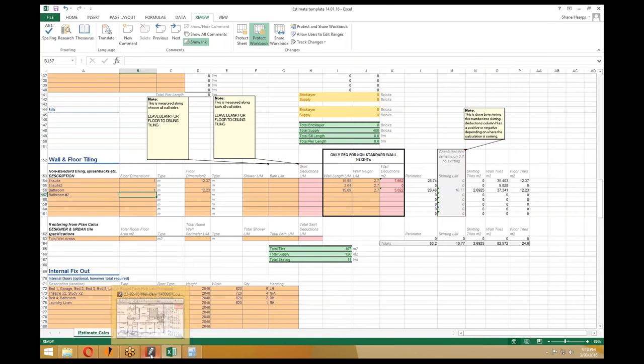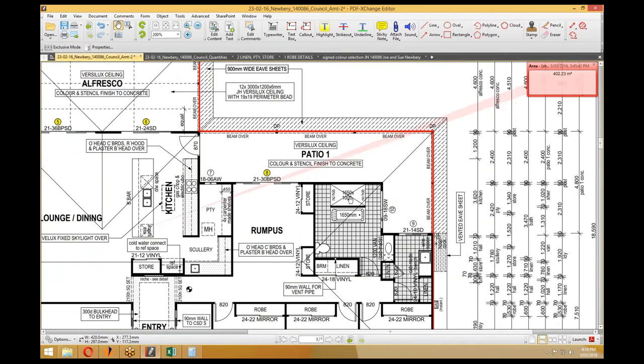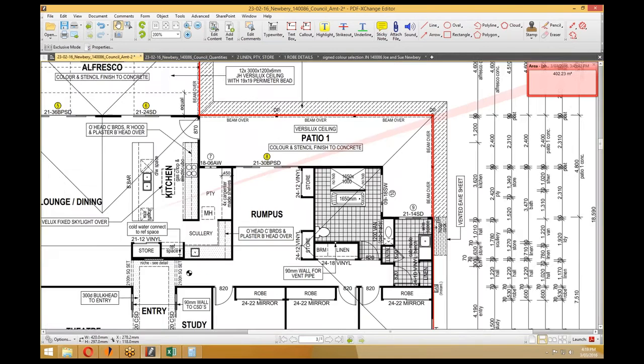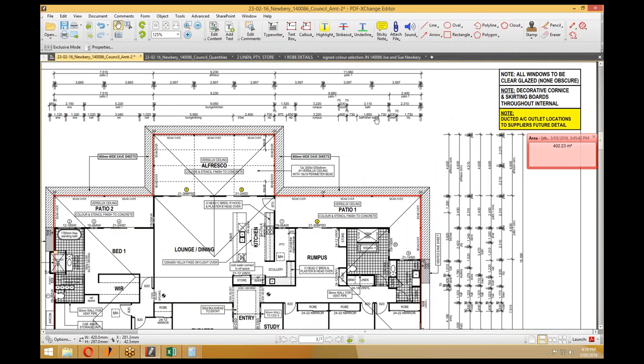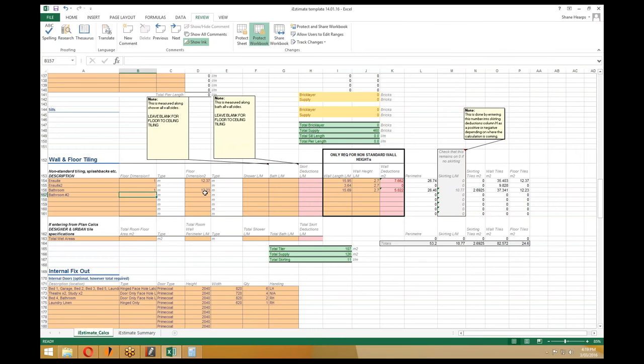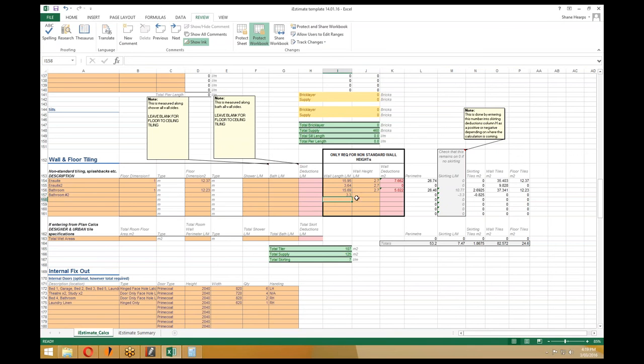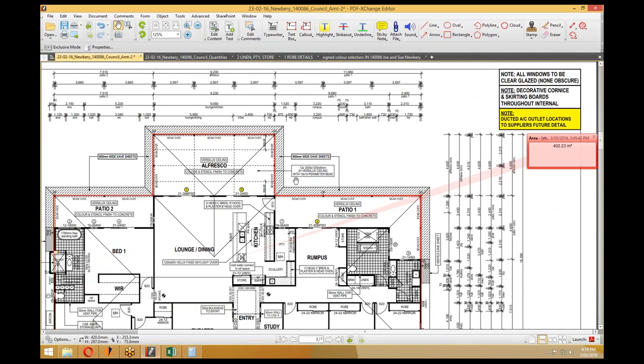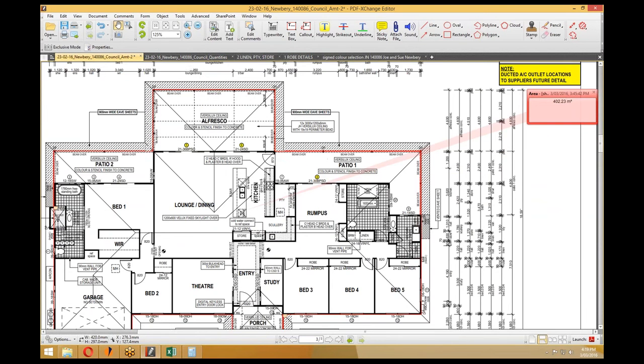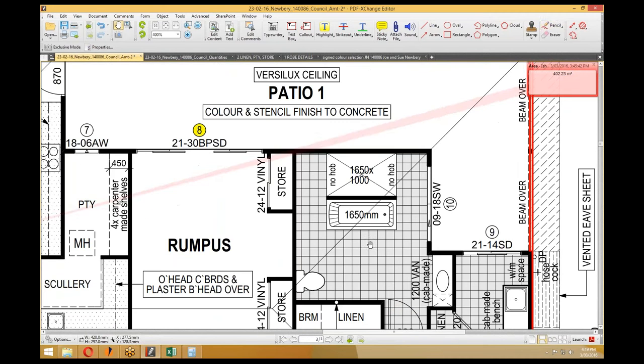Now for the bathroom number 2, we'll pick up this wall here and we'll do that wall twice. 1.65 by 2, 3.3 by 2.7 with no deductions. But then we've also got to pick up the ends of these baths. Keep pressing the wrong button.